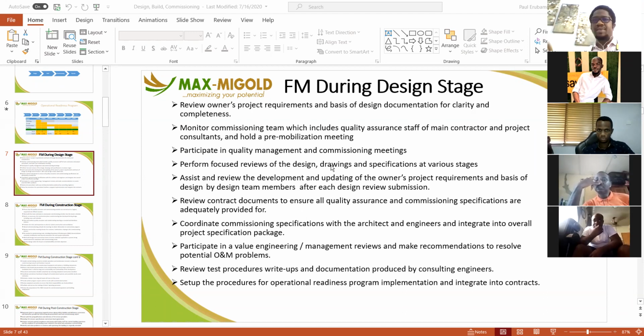And I need to be able to see these are the standard operating parameters in ranges, upper and lower specification limits of these ranges, for each parameter. And this is what we checked. This is the temperature. This is the range that it should be. This is what we actually checked. What's the interpretation? Write it there. They don't want to do that. And I said, no, I'm not going to be part of this testing program. I will not put my signature on a document that does not make sense. We all need to be familiar with what should happen during testing.